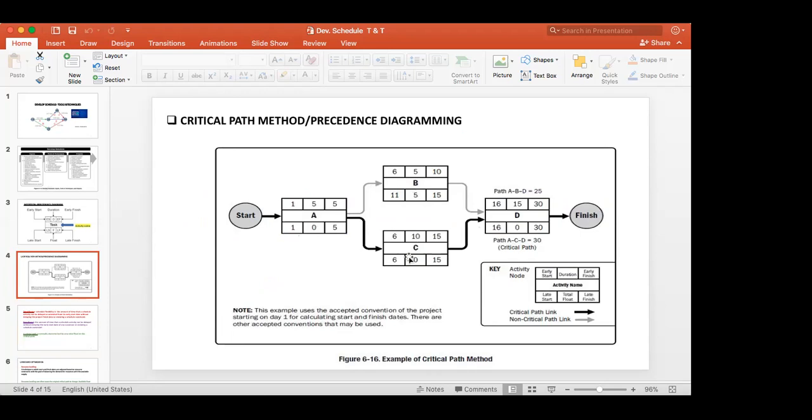But if you take the critical path, there is no total float, so on the critical path total float is 0, 0, 0, 0. Here 5 is there. That way also you can find the critical path. If the float is 0, you connect all these activities, and that will be the critical path.